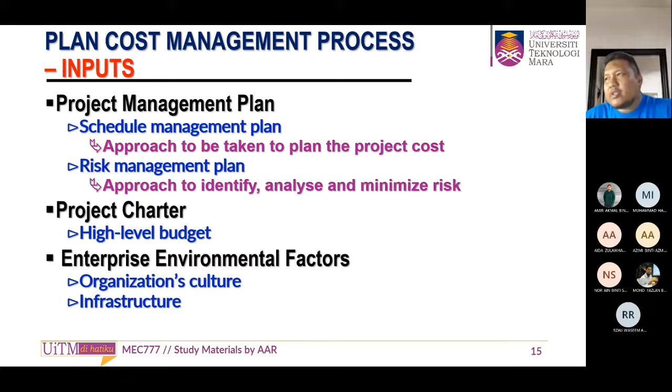Because when we are involved with cost, we know there are a lot of risks that can increase our cost. Next, our input is also the project charter, with the high level budget, because inside the project charter we already declare how much the budget is. So we must include the project charter in our plan cost management.